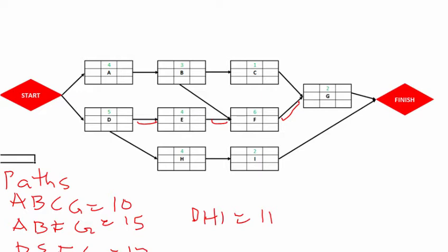In the analysis, you will observe that you have day 1, and when you start the project on day 1, you use a formula called early finish equals early start plus duration minus 1. So 1 plus 5 will give us 6, minus 1, that's 5.